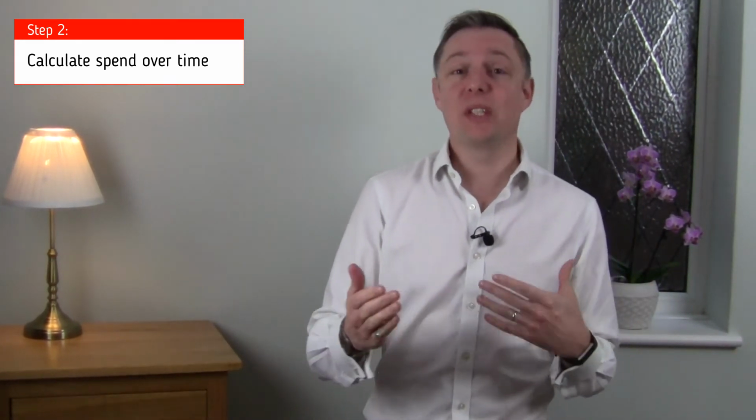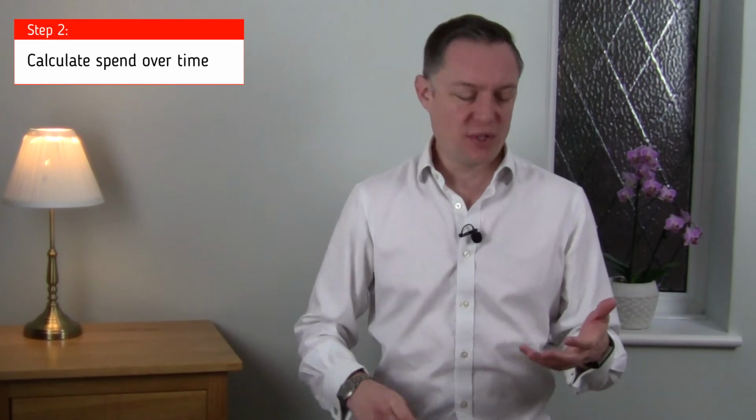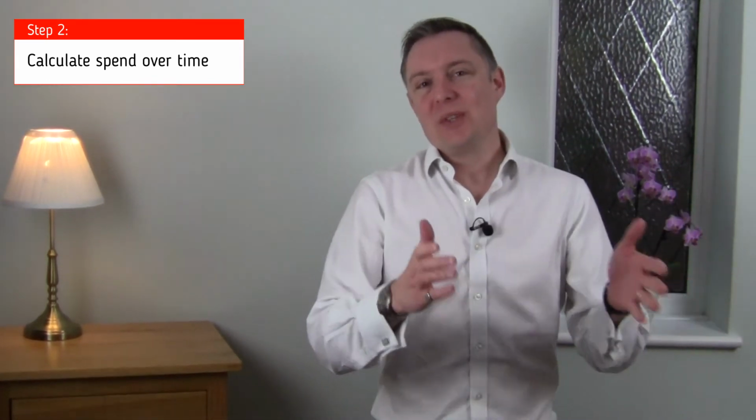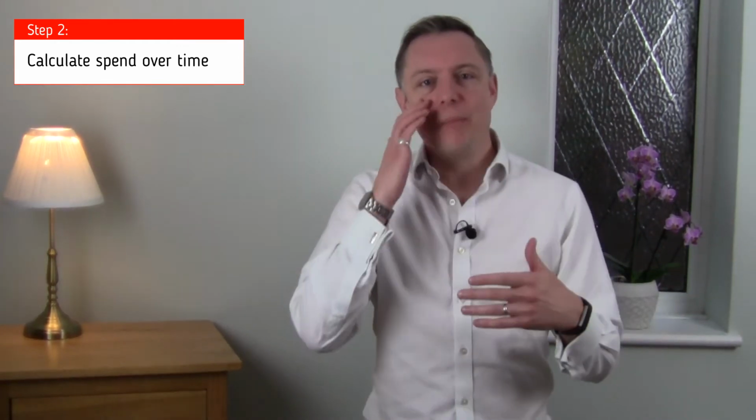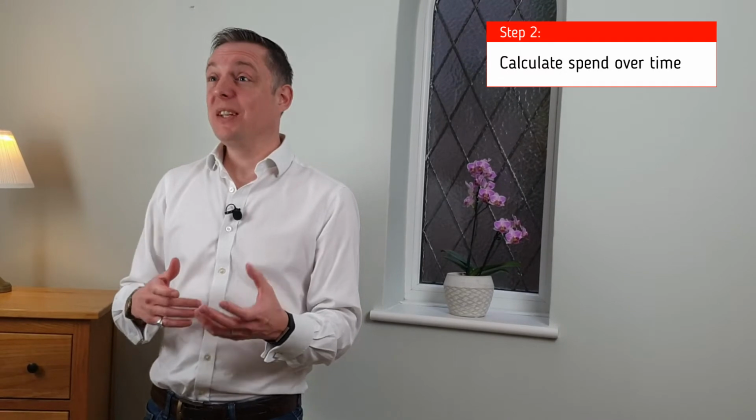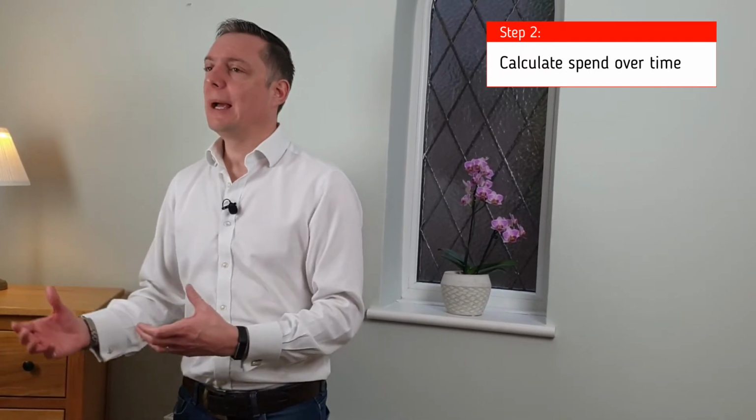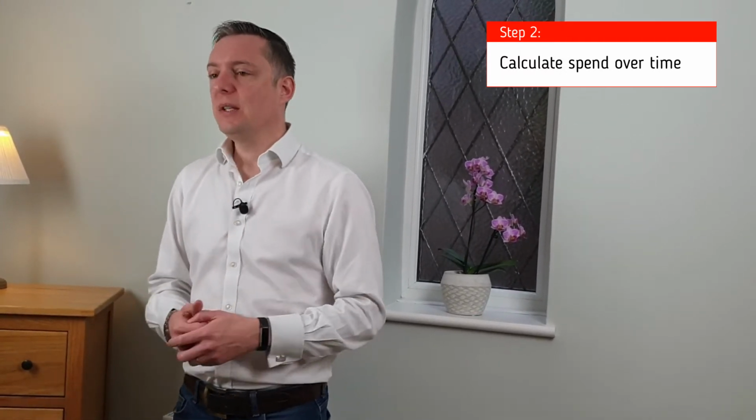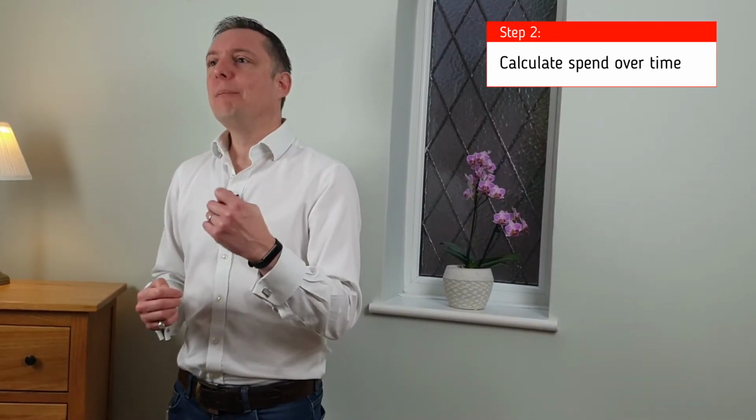This is now a case of stepping through the life of your project and working out when you're going to spend each item. So when do you need to order the flowers for the wedding? When do you need to have paid the deposit on the venue? And what you do is you break it out by month or by week, but keep it fairly high level again. One, it's really good practice just to be staying on top of your money and knowing when it's going out. But two, and this is the main reason, is that you don't want any unpleasant surprises.